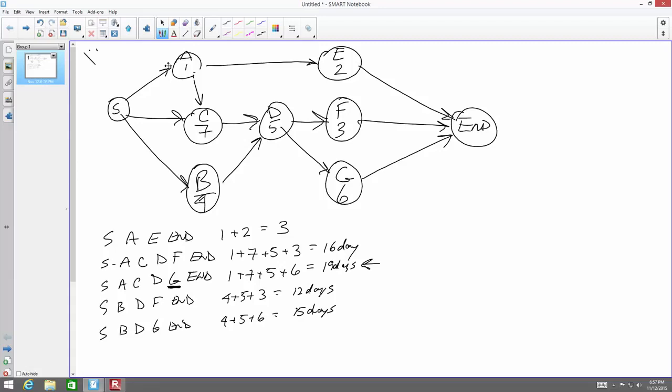You've got salary plus. It's a new term for me. I'm not sure if that term even really exists or if it's legal. And for this particular question, which of the following fee structures is a specified sum paid to the engineer for each day spent on site? Per diem fee. And per diem means a daily fee. So if I'm on the job site, every day I'm on the job site, I get $1,000. Every day I bill them, I get $1,000. Regardless of what I did, if I'm on the job, on the site, doing what I need to be doing.